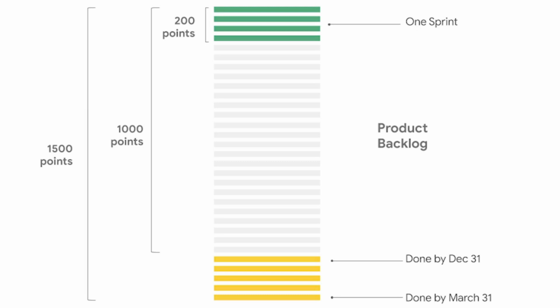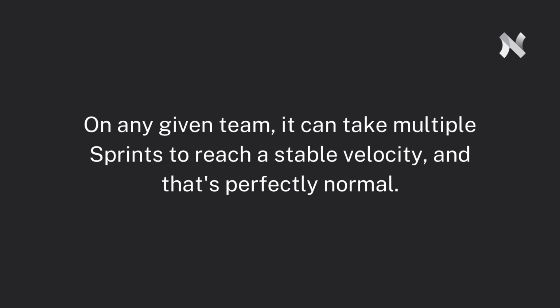What if it's July and the team wants to know what will be available by January 1st? No problem. That's 5 months away. Just go down the backlog from the top and draw a line when you hit 1,000 points. That's a pretty confident estimate based on the past performance of the team. Pretty powerful. If you want to pull in the dates, you can use this information to decide to add people to the team and increase velocity, rearrange the priorities, or make other key project decisions.